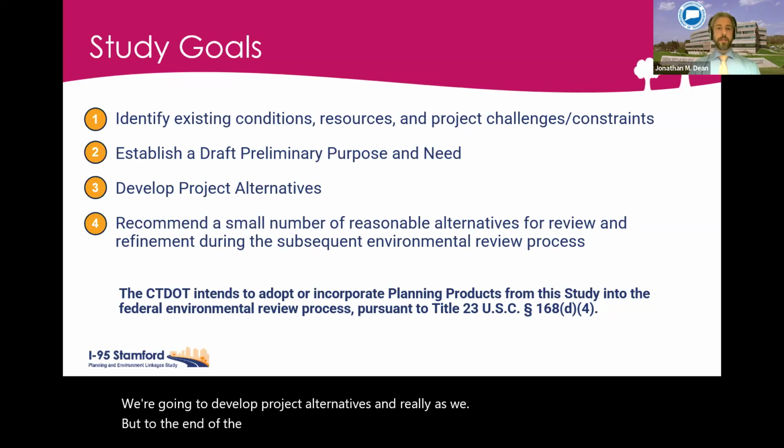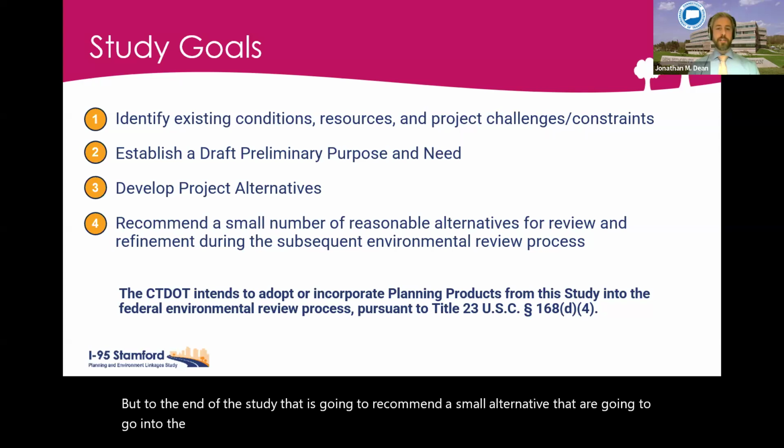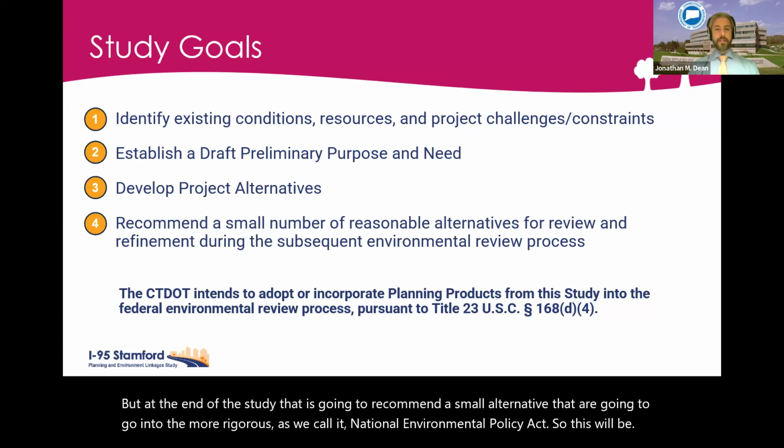We're going to develop project alternatives, and really, as we look to the end of this study, that is going to recommend a small number of reasonable alternatives that are going to go into the more rigorous, as we call it, NEPA, or the National Environmental Policy Act. So we won't be finishing this study and just moving on to construction, but there will be some more detailed review that has to happen from there.